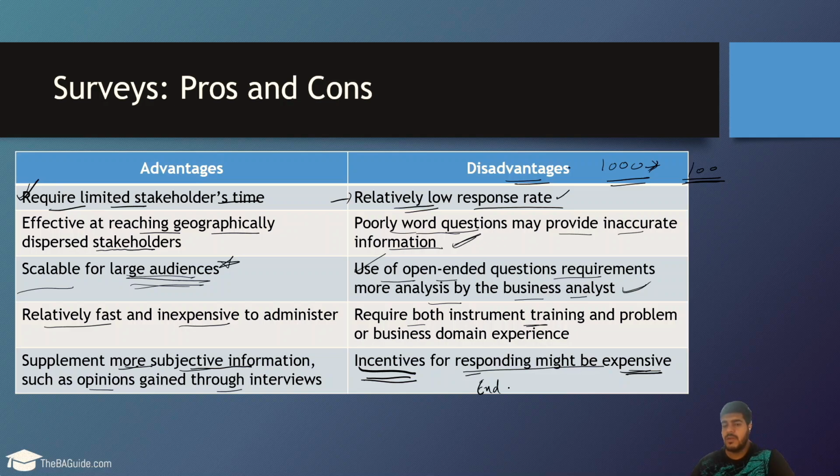So depending on how many end users, for example, we are scaling this to 10,000 users, and all the 10,000 users are doing a survey. Even if we are spending $5 each, for example, we are giving them a gift card, the cost can go to $50,000. So sometimes it could be expensive. We have to make sure we have that proper budget set before moving ahead.